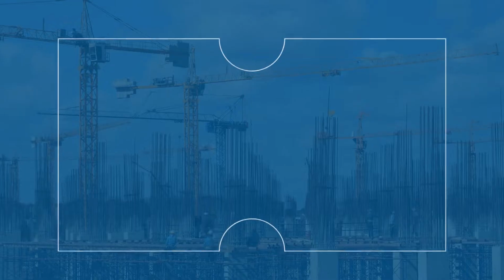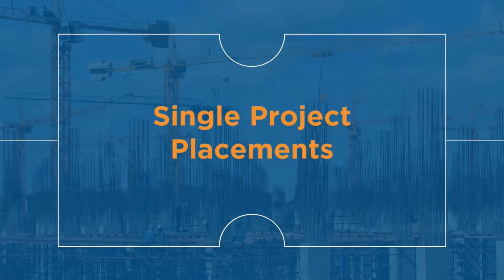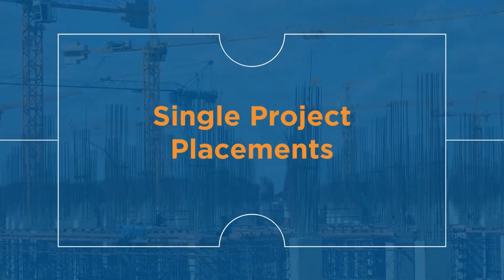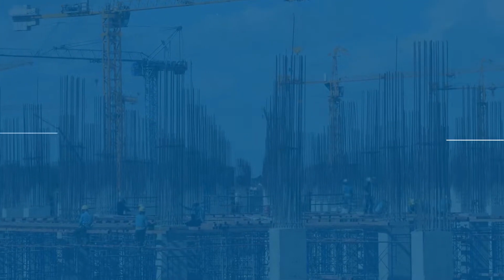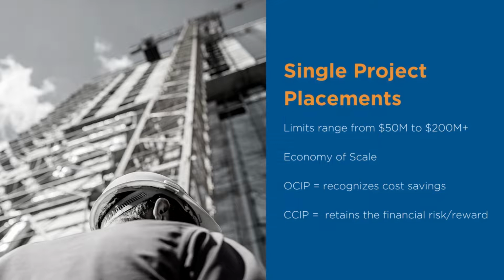A single project placement is a custom product tailored to the specific needs of a project being insured. The coverage provided includes workers' compensation, general liability, and excess liability. The total limits purchased generally range from $50 million to in excess of $200 million, with deductibles starting at $250,000. The carrier selection, coverage negotiation, and program design all take place in the months leading up to the project construction start date. Single project CIPs tend to work out best and yield the greatest financial results with projects that are over $250 million in construction volume.